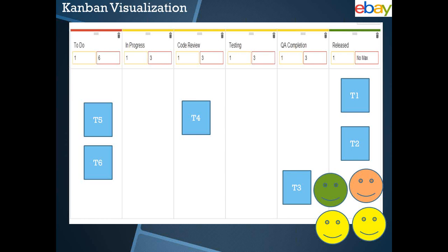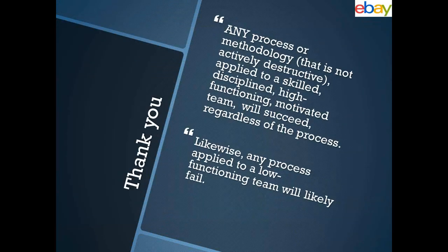So this will enable us to visualize the product end to end before committing to the product. So these are the advantages of Kanban. If you look back at the Kanban board that we showed you, one other good use case is if there are too many tasks on just the testing or too many tasks on the to-do list, then you know that either the PM or the QA, or whichever swim lane has a lot of tasks, is overloaded and needs help. So the whole team comes together collaboratively and sees what we need to do to move this task to the next part of the workflow, and that is the beauty of Kanban.